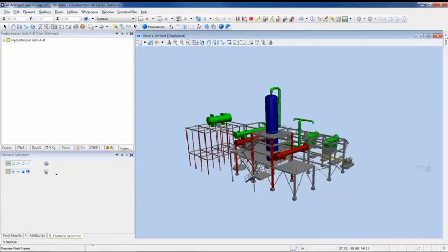As we continue, we may have identified another issue. It would appear that the heat exchangers are being installed out of sequence, with the top one being installed before the bottom one. And this is obviously incorrect, and again we will make a note.